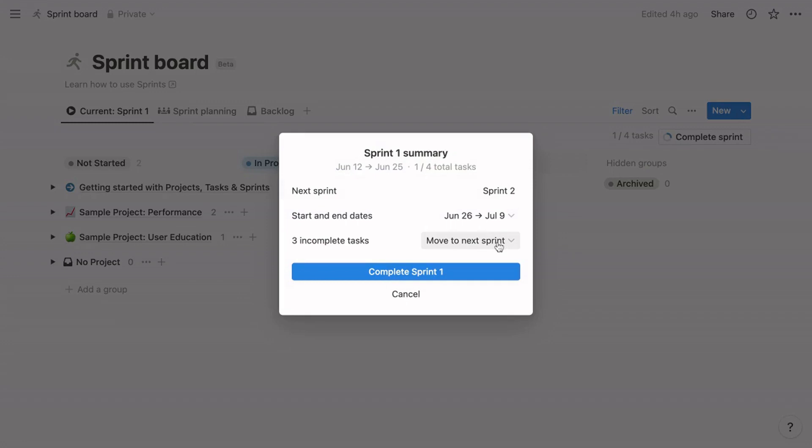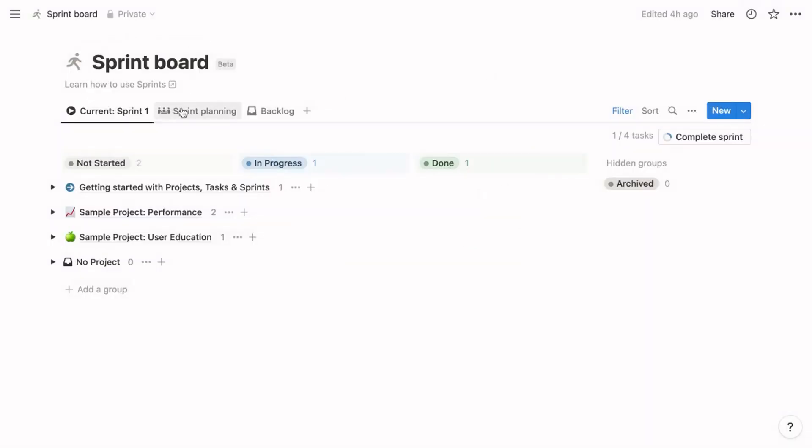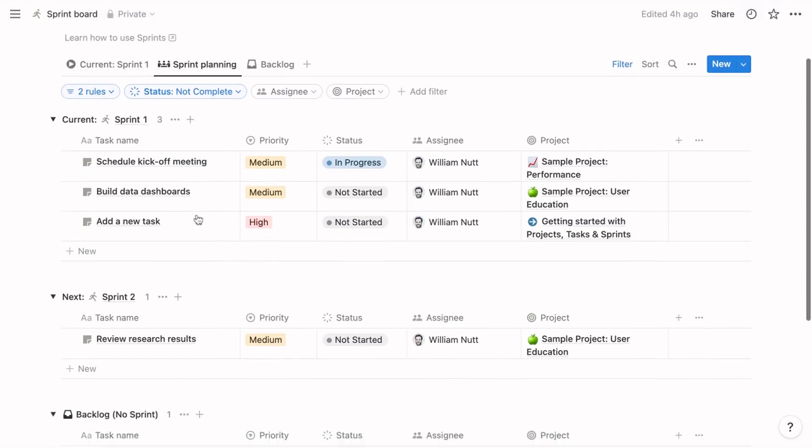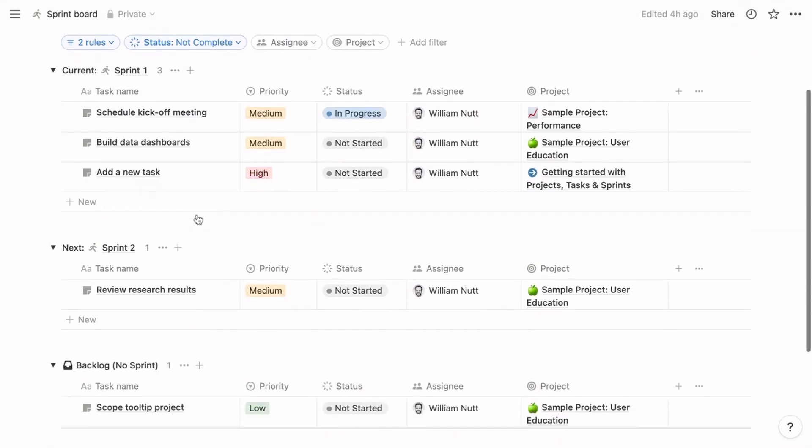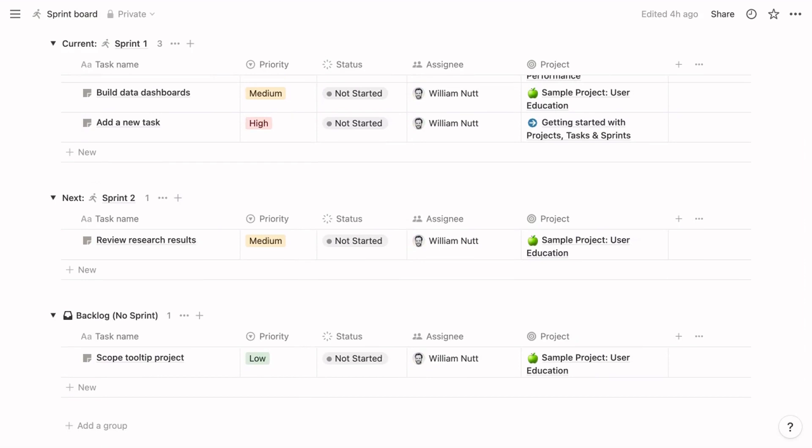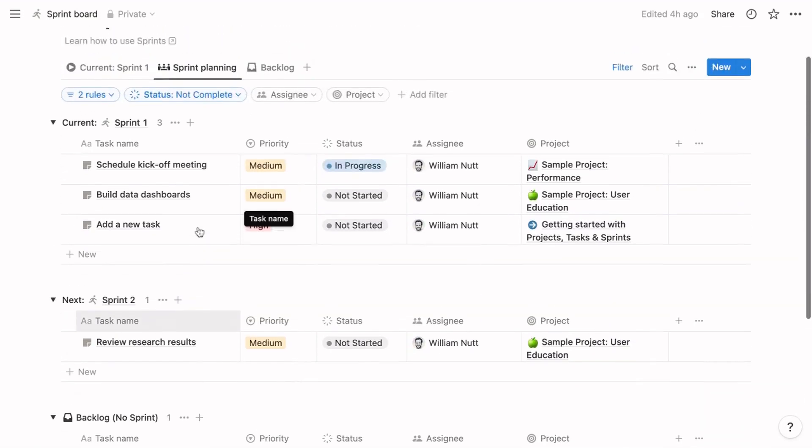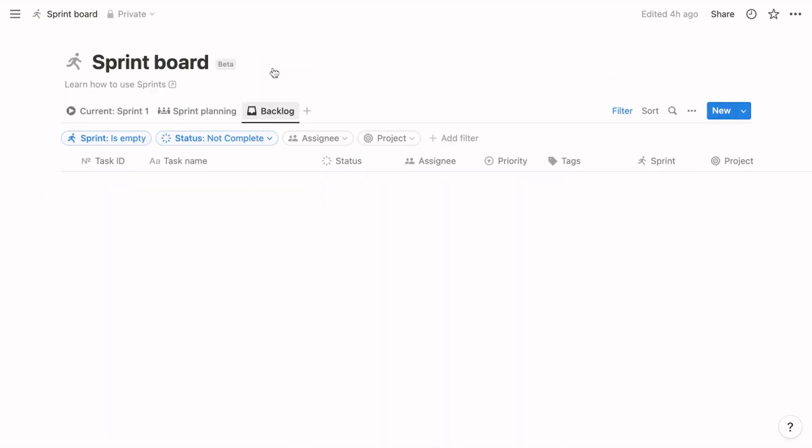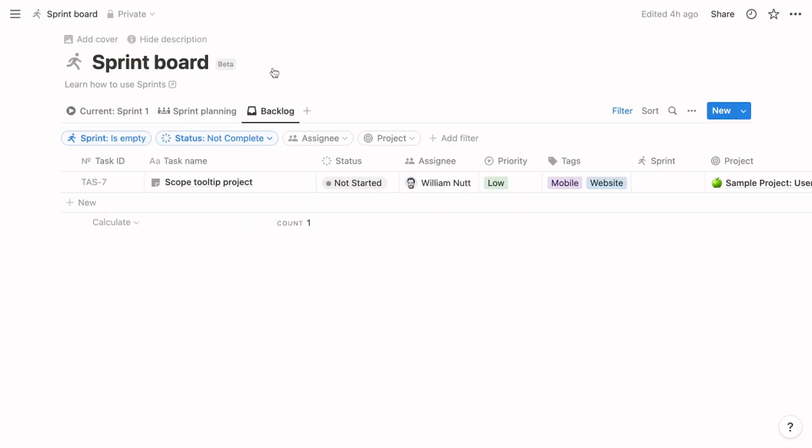The backlog is a repository for tasks without a sprint assigned. The sprint planning view is a table with a group or toggle for the current sprint, the next sprint, and the backlog, which again contains tasks without an assigned sprint. Finally, the backlog view displays only those tasks without an assigned sprint.